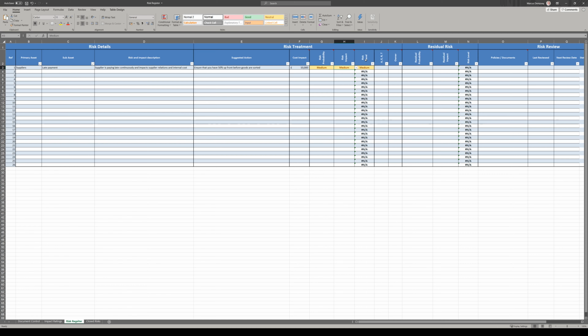And then, as you can see, the risk level is turned medium. If I had put the probability it was going to be high, that it's always going to happen, you see that the risk level has gone high. If the impact I'd put here was going to be a low, so the probability is it's always going to happen, but the impact to your business is low, the risk level is always going to be high. So anything that is pretty much a medium or a high in this risk level bit, you should identify and resolve as quickly as possible.